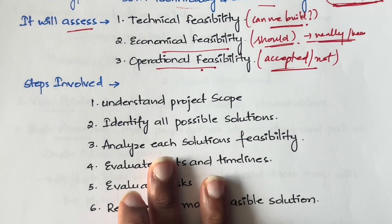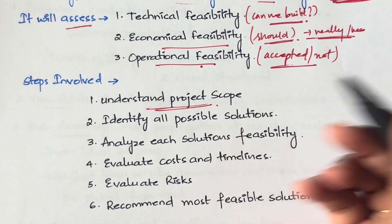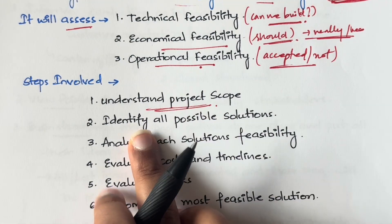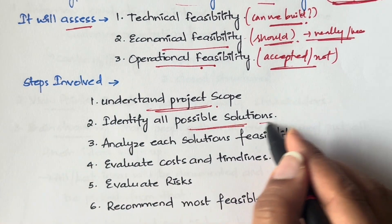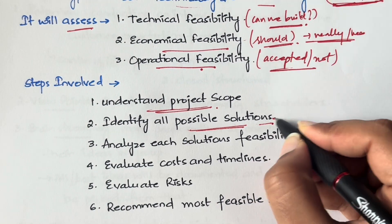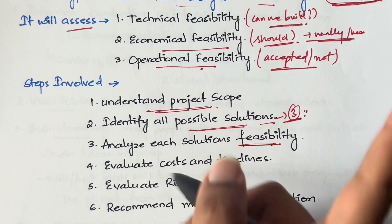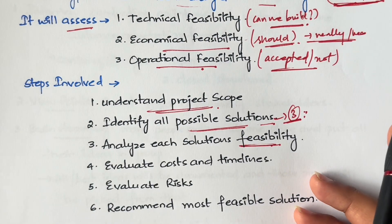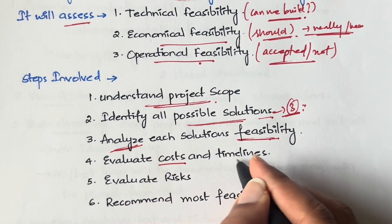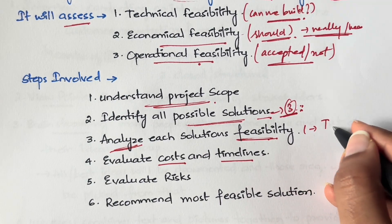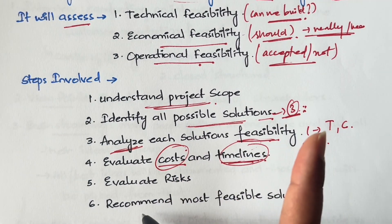The steps involved in a feasibility study are: first, understand the scope of the project. Next, come up with all possible solutions for the given problem. For each solution, analyze all feasibilities — technical, economical, and others. Then evaluate the cost and timeline for each solution — how much time and how much cost is required for each one.